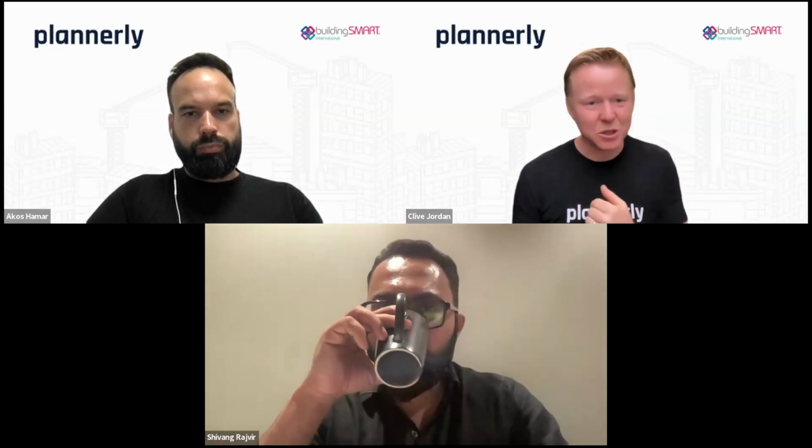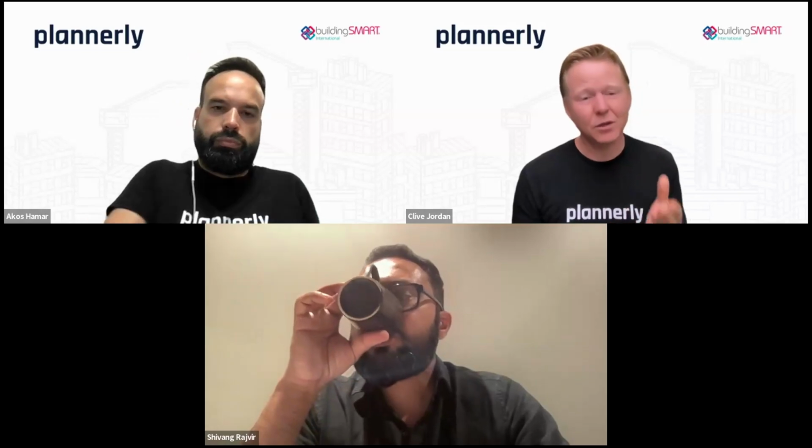Because moving on to the certification process, it's a two-step certification process to show that the company is able to implement. The first step is about showing your templates and your workflows, your processes that your company has. And the second one is, as you said there, showing proof that you're using it on a project. And so that combination is your certification process for ISO 19650.